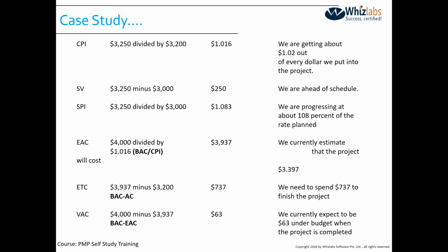But why we talk in terms of money, there is also a reason. Just imagine a situation here that there are 2 days. We have to do a certain task, and we have 2 days to complete that task, and I have 2 resources to complete that task. To make it very simple, the cost of one resource is $1. So for 1 day, I would be spending $2, and for the second day, again $2. That means my budget is to spend $4.